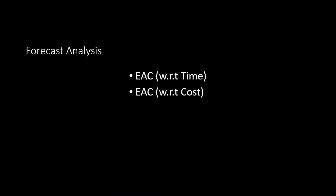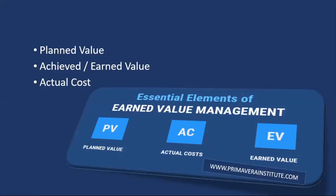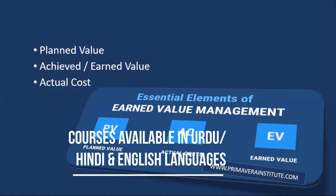To prepare a dashboard on a weekly or daily basis, we calculate all these parameters using Earned Value Management technique. We need three inputs, then apply certain formulas, and get output as KPIs. The first input is Planned Value, the second is Earned Value — also called achieved value or work done — and the third is Actual Cost.